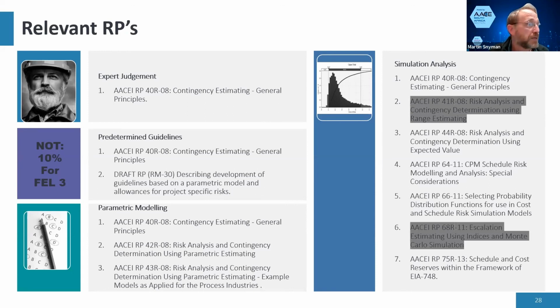There's something wrong with that process, in that the accuracy of the estimate should include Forex and escalation changes. We never tend to come back and put that revised Forex, revised CapEx, revised escalation into the total CapEx and re-measure the accuracy.